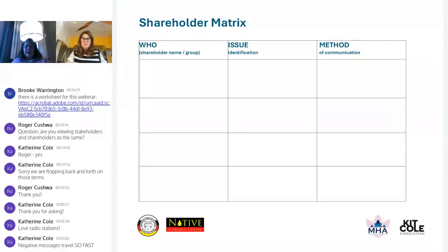And a lot of times Kit and I are hired to do that work, to work with the federal agency representatives in the office, also work with tribes, sometimes tribes are impacted by that, or perhaps there's a Section 106 review with the National Historic Preservation Act, making sure that you're working with the THPO.